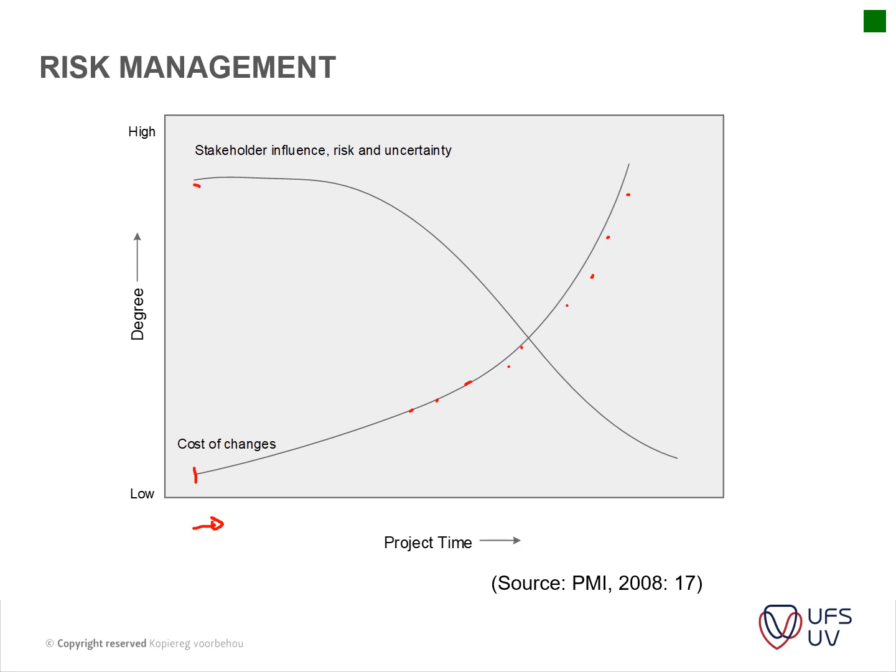When you start out on a project, your risk from stakeholders is quite high because you're still establishing what the scope is. Remember that slide between the Burj Khalifa and a small house? It really makes a big difference on what the client actually wants. A simple thing is, are the stakeholders or the client actually the owner of that plot of land?